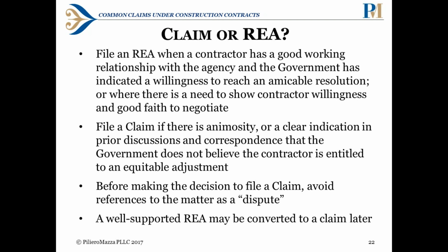So, should you file a claim or an REA? We generally advise clients to file an REA when you have a good working relationship with the agency and the government has indicated a willingness to reach an amicable resolution, or where there's a need to show contractor willingness and good faith to negotiate. You do not need to file an REA before filing a claim.